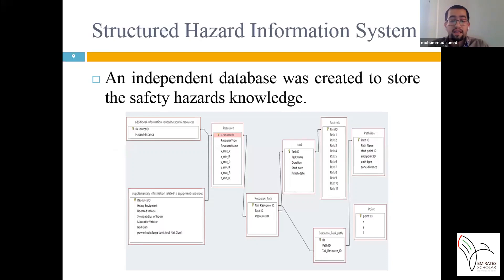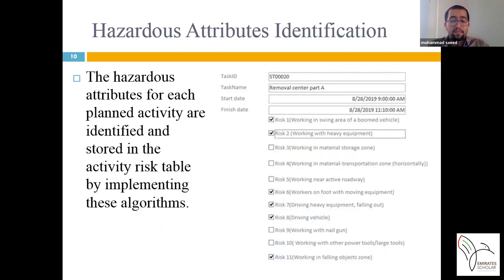The desired data was extracted from the generated 4D BIM model and stored in the created database. Additionally, some data was also taken from the user. The algorithms for identifying each hazardous attribute were implemented using information system capabilities to write queries. The hazardous attributes for each planned activity are identified and stored in the activity risk table. The output of the developed information system is a risk table showing the identified or non-identified hazardous attributes for each activity. The figure illustrates a sample form designed to display this information after analyzing the case study project.